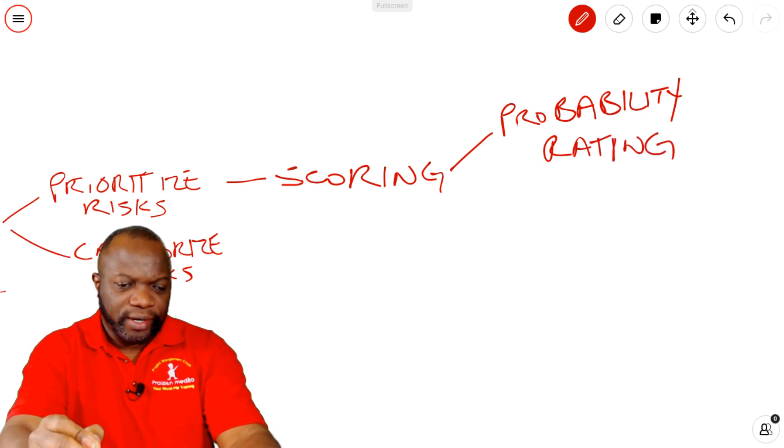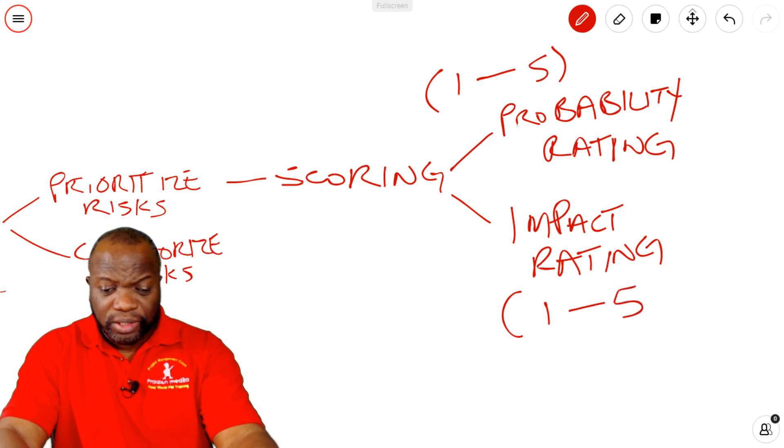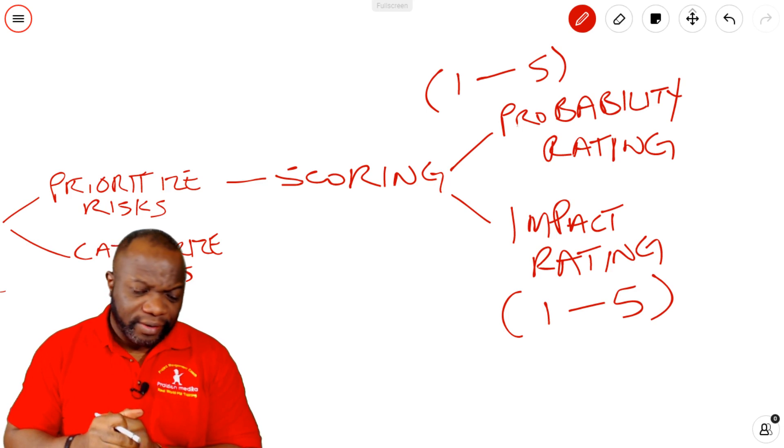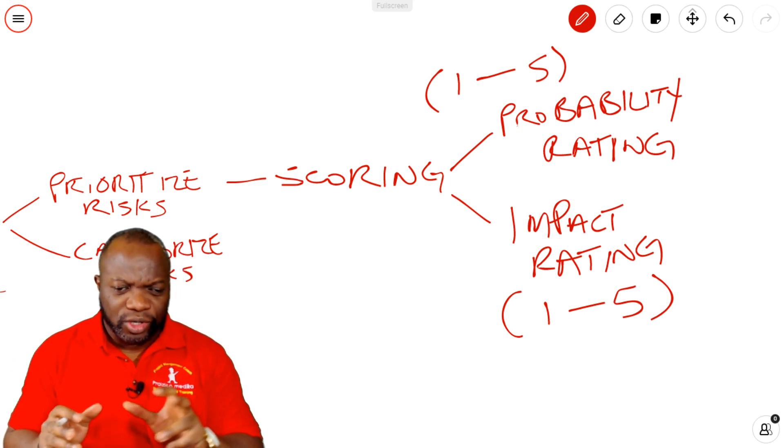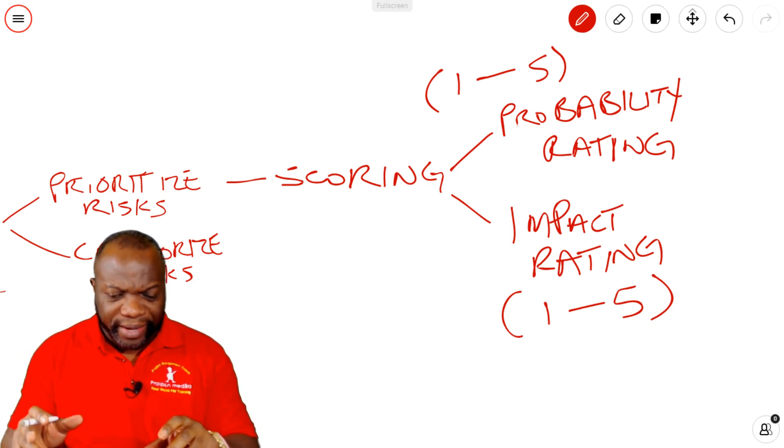And the probability rating could be, say, on a scale of one to five. We talk about an impact rating. And let's say the impact rating was on a scale of one to five to make it simple. Even though in the real world, the impact could be rated differently, like one to ten or one to eight. But the bottom line is, you've got two ratings: probability rating and impact rating.